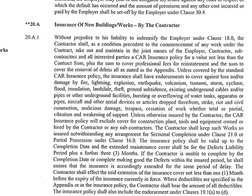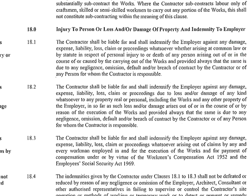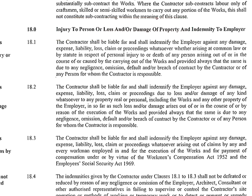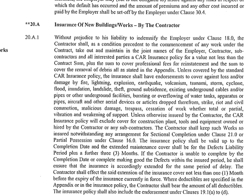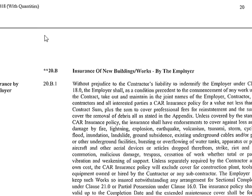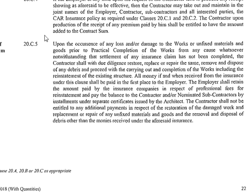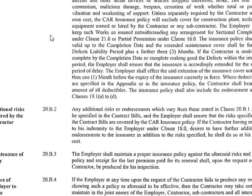Clause 20 of the PAM contract 2018 is about insurance. This is an extension to Clause 18, related to the liability of the contractor to the employer in terms of injuries to persons or loss and damage of property. We know that there is a need for contractors to have insurance to cover those. Clause 20 is rather long, with quite a number of clauses; refer to the PAM contract 2018 for the full text.